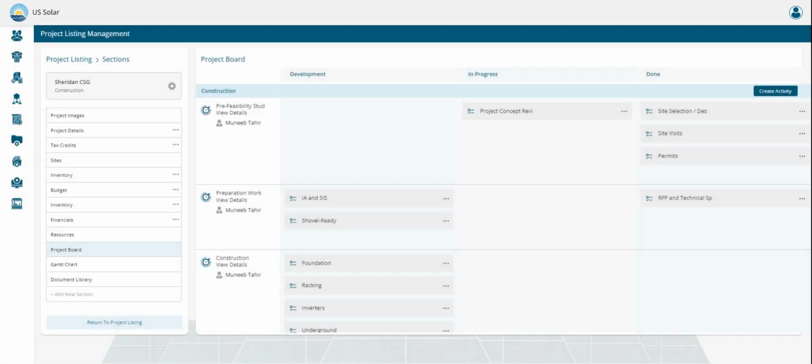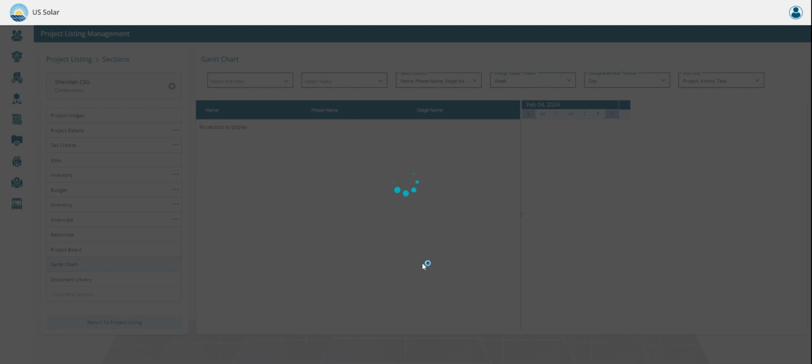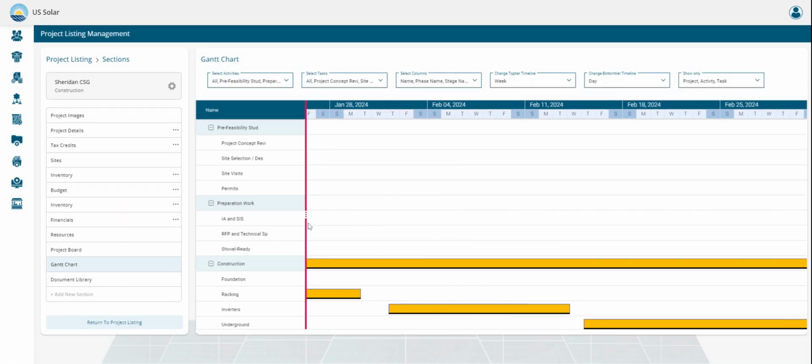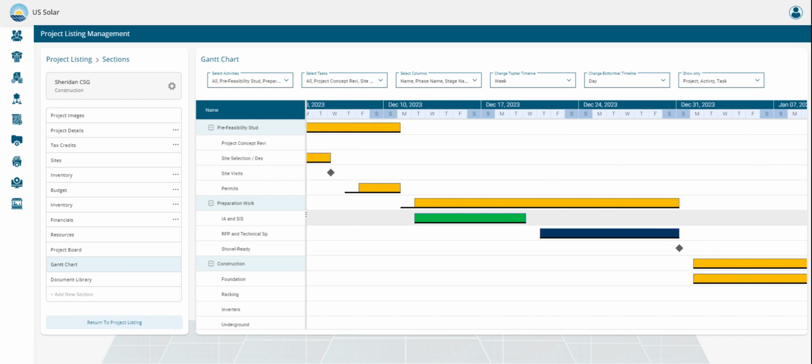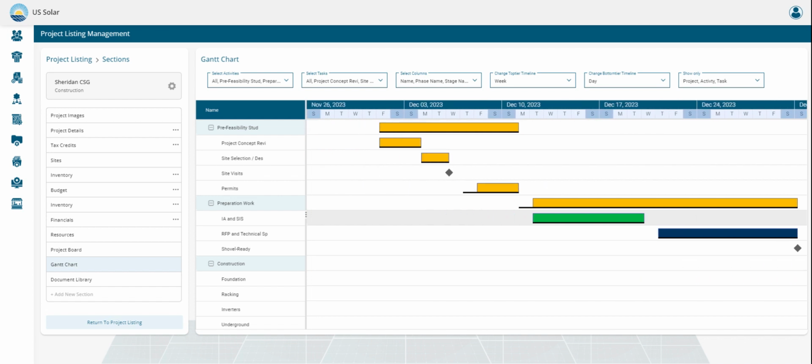We also have a traditional view of a Gantt chart, which every typical project manager likes to see. So this basically gives you an overview of the project, whether it is on time, on delay, or not. So I'll explain a few main principles right here. This black line underneath is depicting the estimated start date and end date. The line on the top suggests the actual start date and end date, if provided.